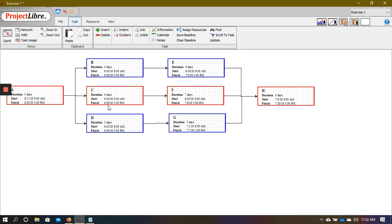If you look at this diagram that we made yesterday, we've got three paths. We've got the path on the top, which is A, B, E, and H. If we add across this, we're going to get 5 plus 3 plus 6 plus 8. So that's the duration of this path, which happens to be around 22 days.